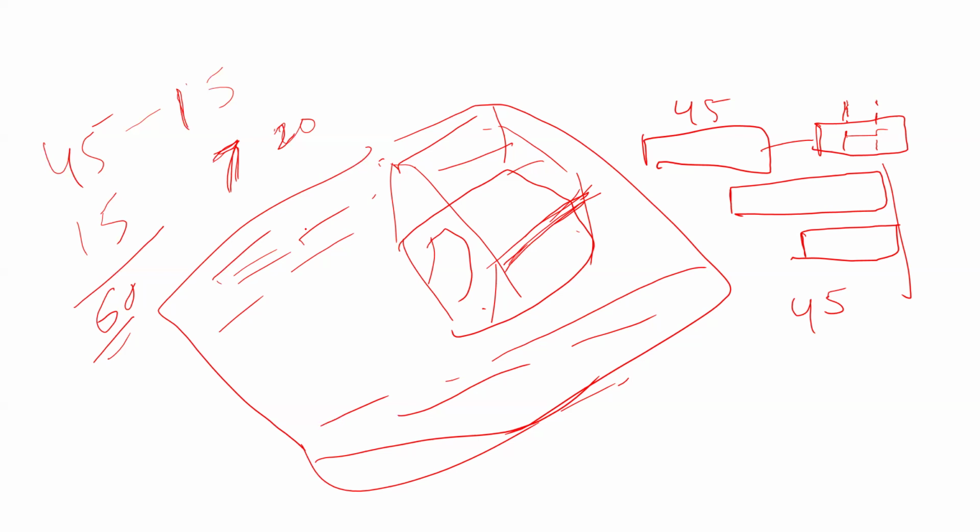Yes. Now, those people who are familiar with civil, not civil engineering, but the basics of it, you would know that once the slab is put, you cannot go ahead and start working on the next floor the next morning. You need to allow it to set for 21 days. You know that? Yes. That's called curing. You need to let it set there. You need to put water on that and all that. So it takes 21 days.